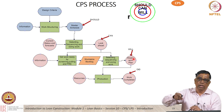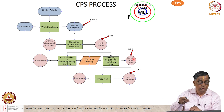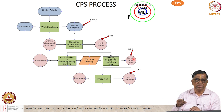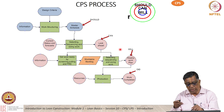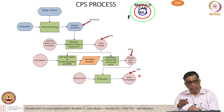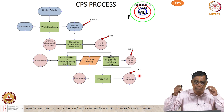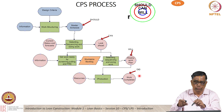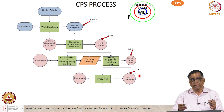Every day you come back and do a process check — ask him, 'Have you done the work?' And he will say, 'Yes, I did.' So there is a progression of 'should' to 'can' to 'will' to 'did' over time, where you cascade down with a narrowing focus. That is the great utility of the Collaborative Planning System — we are narrowing down our focus.